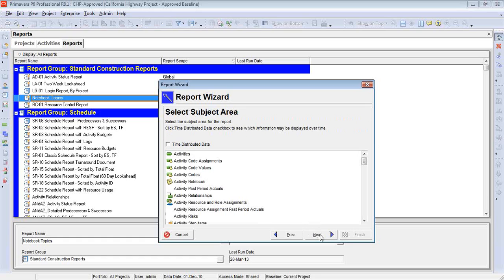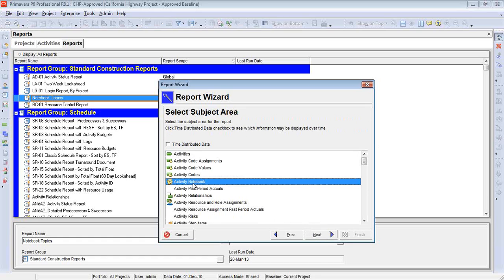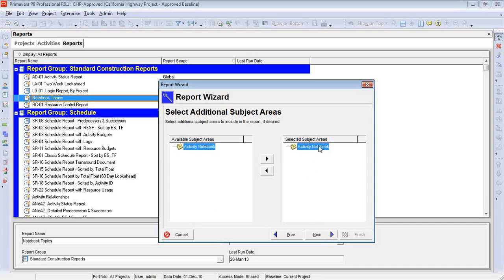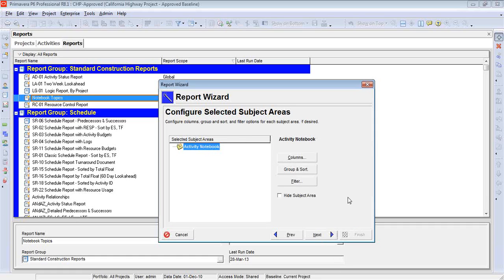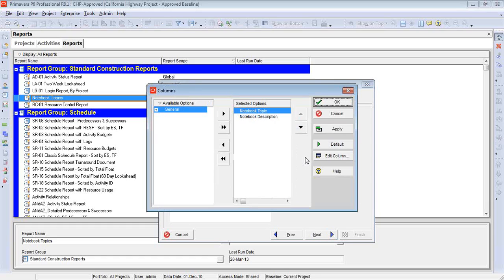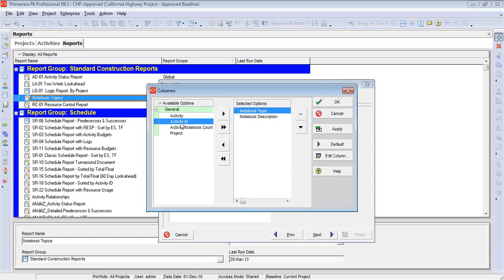Thankfully, the notebook topic one is an easy report. Let's start the process — click on Next. And there it is: that's the category we're looking for — notebook, activity notebook. There is such a thing as a project notebook, stored in a different place. So let's go to the next screen, where our subject area that we selected is simply Activity Notebook. In the next screen after that, we're selecting what columns we need. Thankfully, there's not a whole lot of columns to even worry about, which is why this report is so easy.